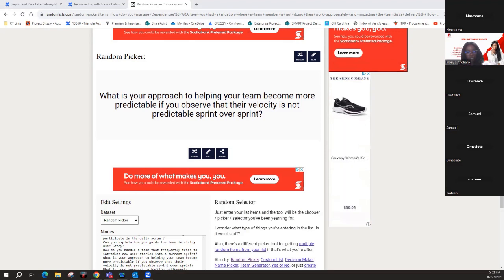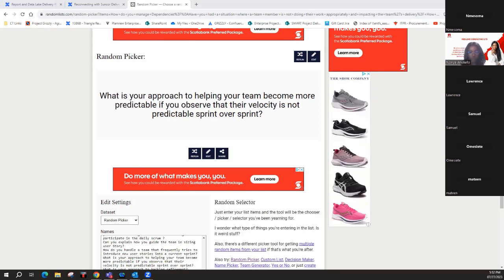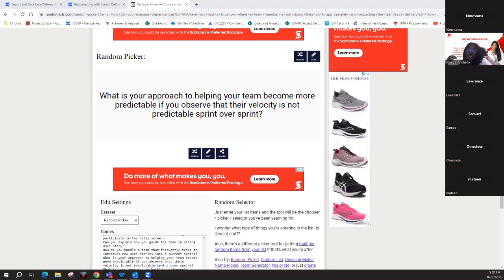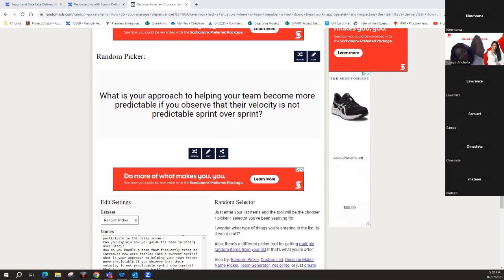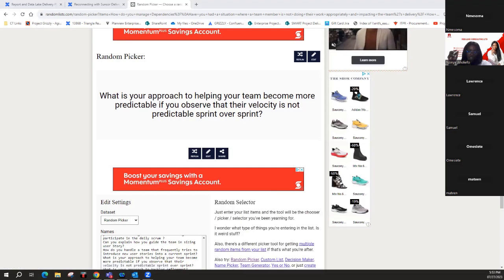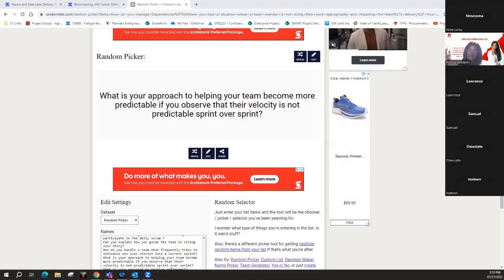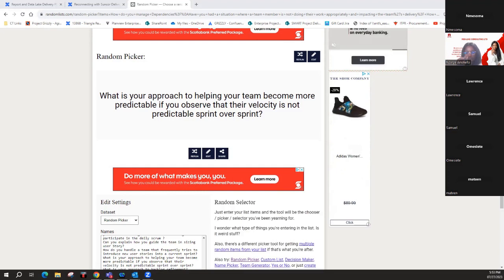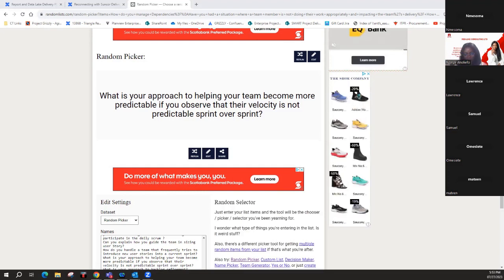If we're saying that a team is not predictable, it means that let's say today they complete 20 story points, in another sprint they're completing 50, in another sprint they are completing 10. It doesn't show predictability. There must be something wrong somewhere. We're not saying that there won't be variances. If I complete 25 this week and 20 next week, it's not bad. Maybe 18 and then back up, maybe 30. But we need to see it being even over time, right?